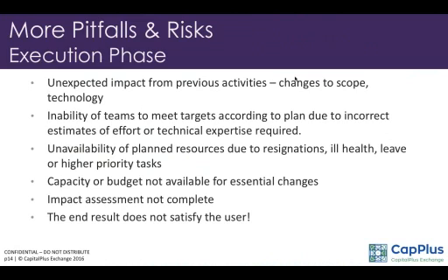things like that, or next of kin, or your parents' name, or your wife's name, may not be available. You need to plan for these things, and it takes time to populate this type of data. So that's why I say, everybody thinks that it's easy, even when it comes to training. They say, okay, it's easy, we call all these people, but what you need to plan out is, if you pull people out from branches, how are they going to manage?